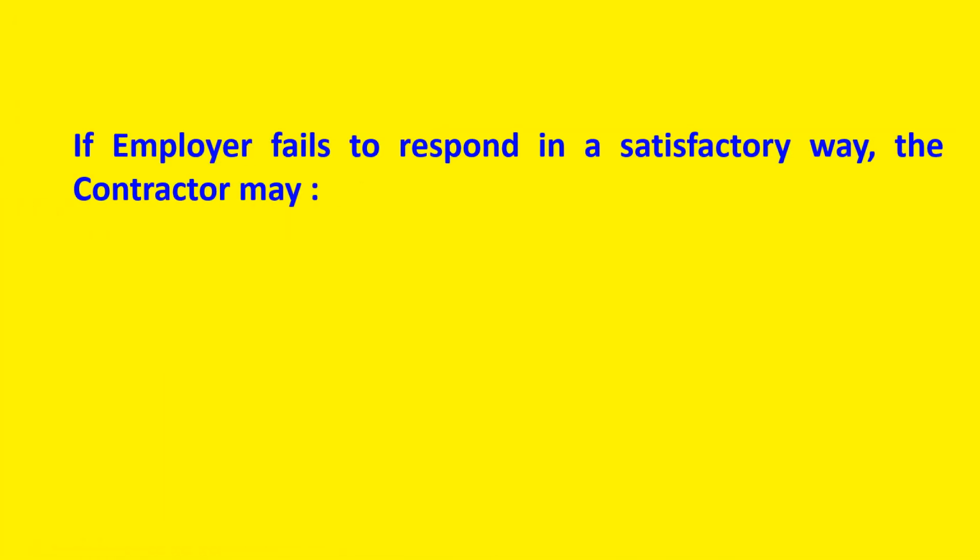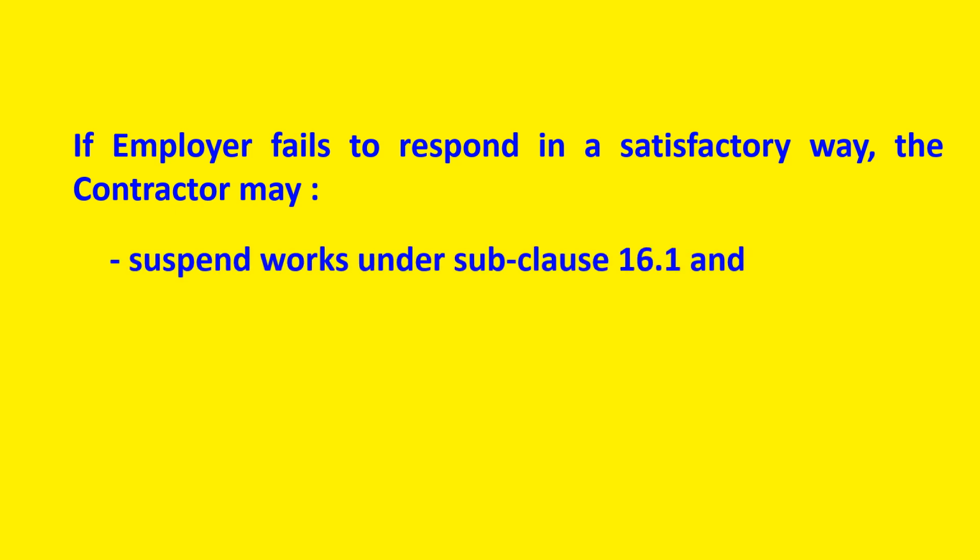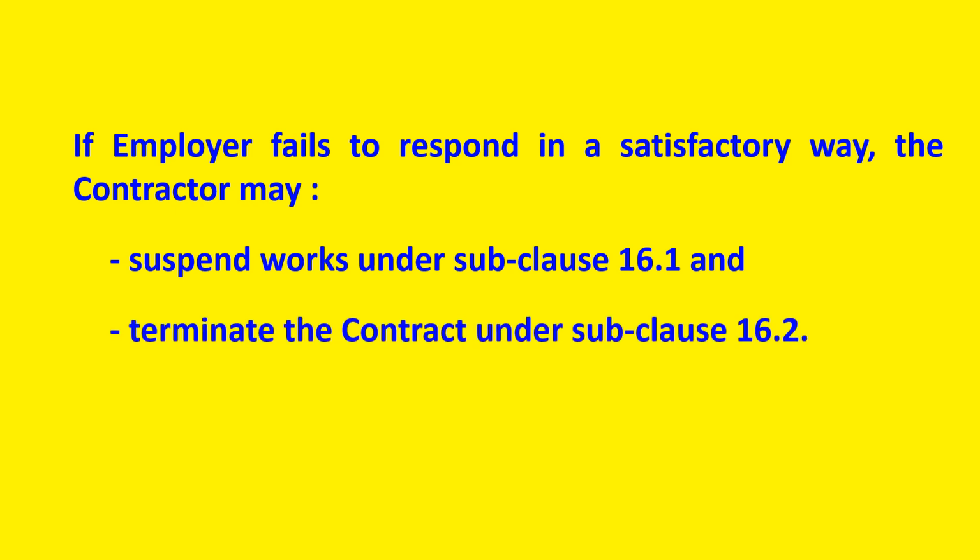If the employer fails to respond in a satisfactory way, the contractor may suspend works under subclause 16.1 and terminate the contract under subclause 16.2.